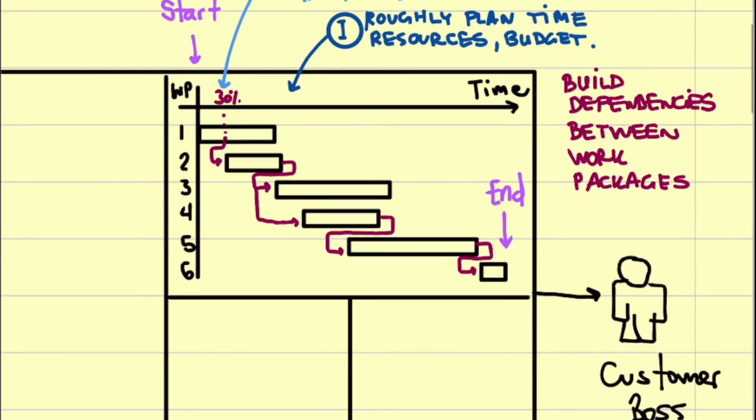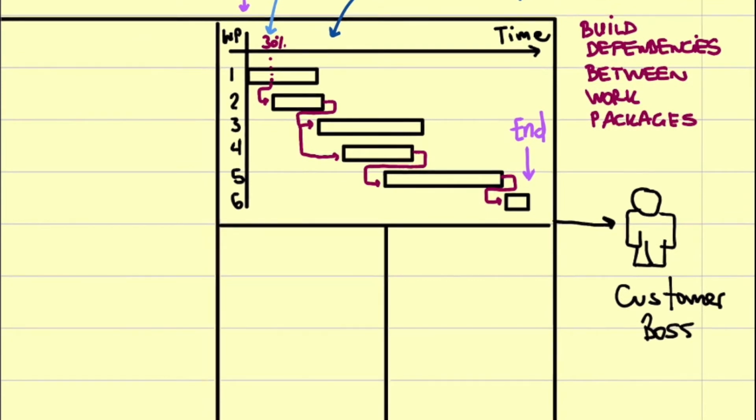Okay? So we define our own rules when we say we start at 30%? Yeah, you define it. You're the project leader, so you decide once I'm done by 30% with my base, I can start having the logistics done for my structure, or I can deploy the crane so that I can build up stuff, you know? So you decide the dependencies.